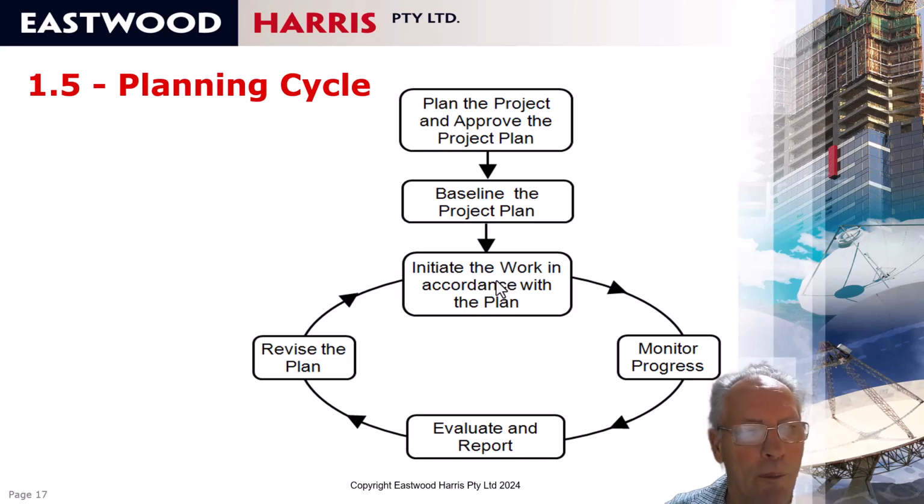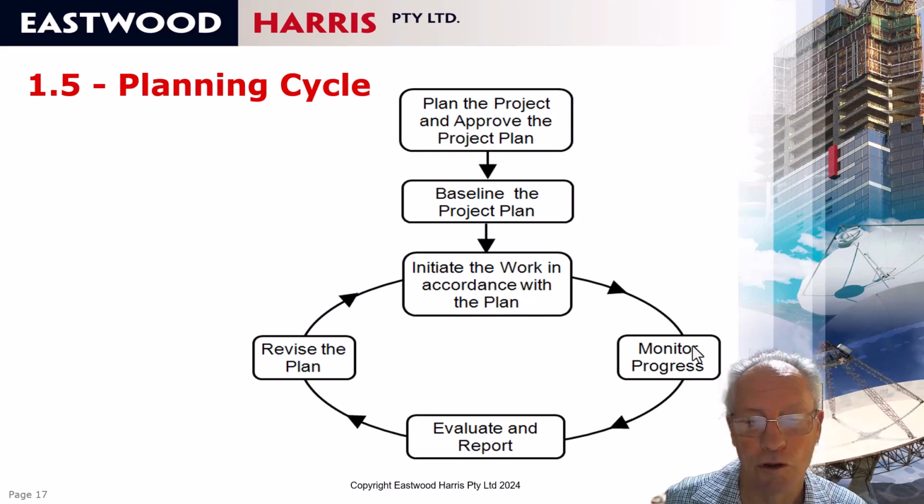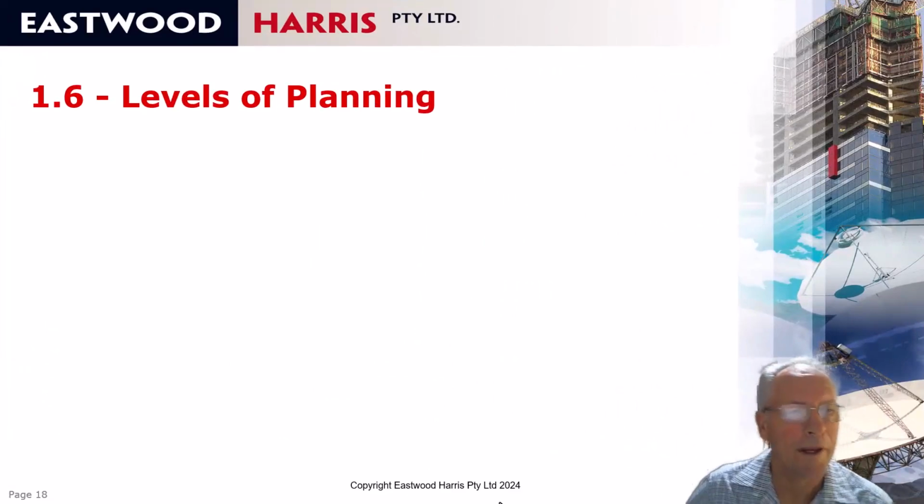If you don't follow your plan, then you'll find it's difficult to claim extension of time and justify changes to productivity if you're not following the original plan. You should then monitor progress and update the schedule on a regular basis, evaluate and report and revise the plan if necessary.